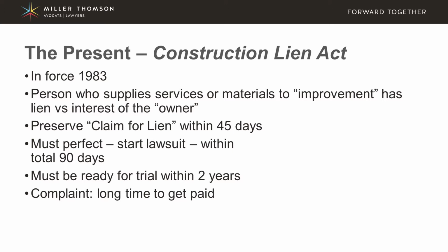In order to preserve a construction lien, meaning to register the construction lien against title to the land, that has to be done within 45 days.